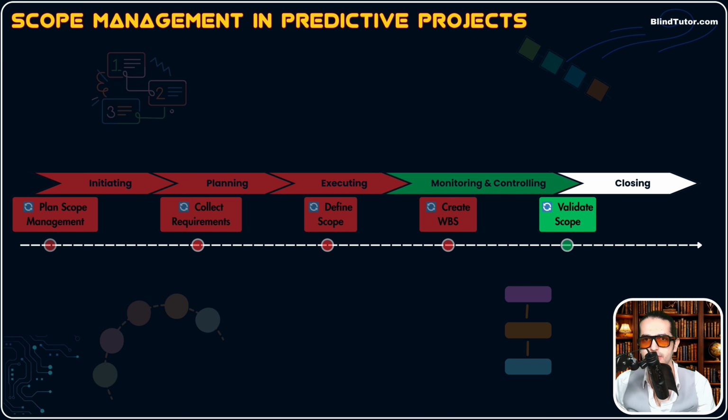Now, what's the executing phase? The executing phase means the team will do the job and implement all of those plans. And the executing phase and the monitoring and controlling phase happen at the same time, simultaneously. It's not in an order. Initiating happens first, then planning happens, these two are done, then executing and monitoring and controlling happen at the same time. So the project team executes all those plans, does the job, and makes our deliverables.